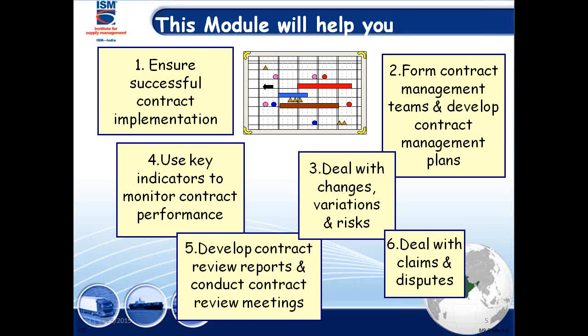Then, to form the contract management team, you have to form a team for this, develop contract management plans, and deal with the changes. The changes could come from the suppliers. How do I deal with them? They want to change the quantity, I want to change the quantity, I want to change this. There are potential risks. The items are coming from X country, let's say Thailand, and there's a flood there. How does it affect my delivery? All those factors have to be dealt with.